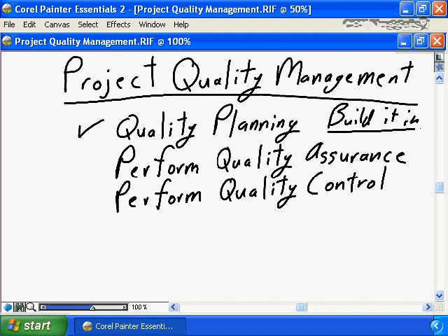By having the tasks in the plan, the team has the task assignments, the team has the charge code with which they can charge the time they spend on quality processes to ensure that the quality plan for the project is enacted.